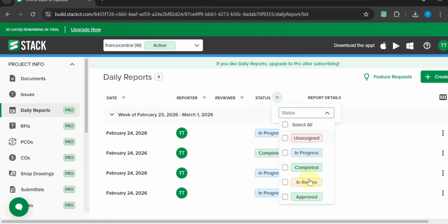Next, review workflow progress to compare planned work with completed work. Open workflows within the same project. Use the status filter to view completed, in progress, or open items, and pair it with a due date filter for the same reporting period.